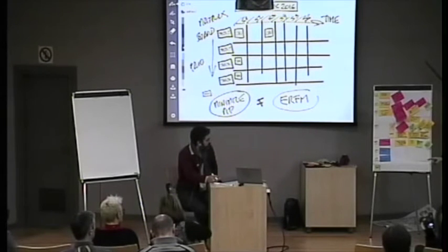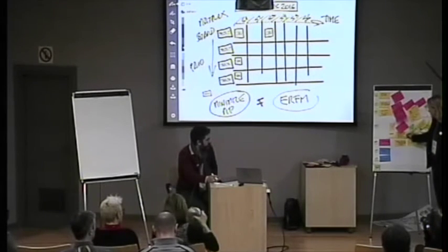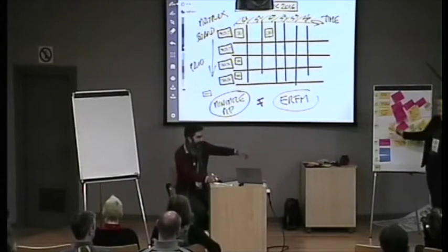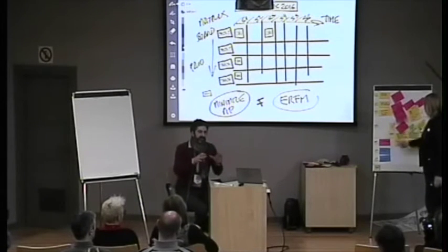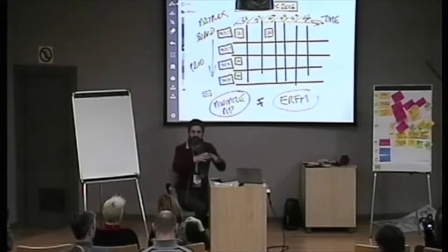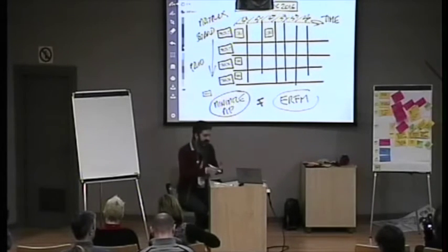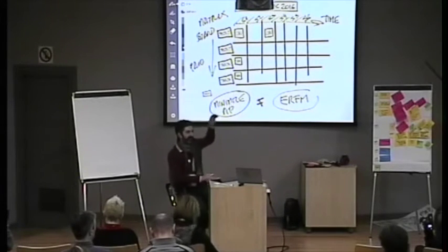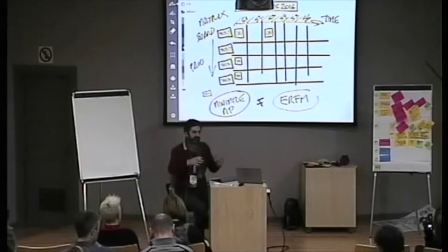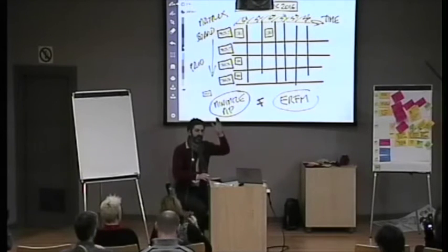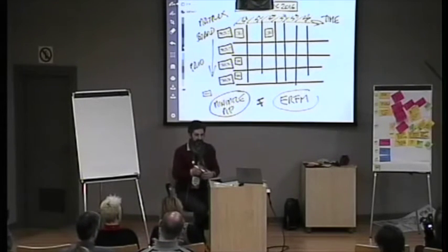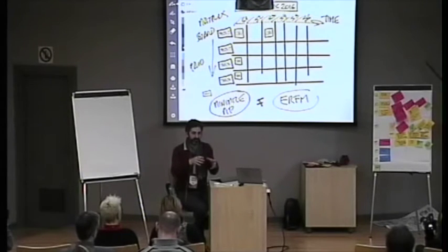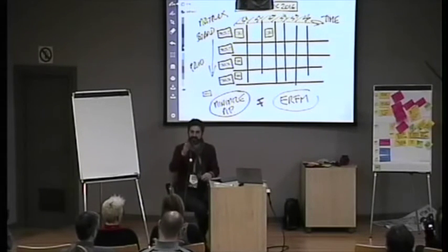So our sprint planning is populated by constraint, priority, and capacity. The matrix board is a pattern that can be applied at different levels of granularity — different levels of planning. Whether you call it portfolio, program, or release planning, you're visualizing a certain dimension: sprints, projects, and tracks. What happens when you actually have to plan a sprint is that you might want to adapt your sprint board — the board you use to visualize and manage work during the sprint. You might also want to use a similar pattern when you have tasks or certain things that have to happen on a certain day during the sprint.